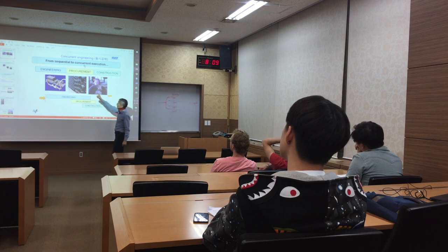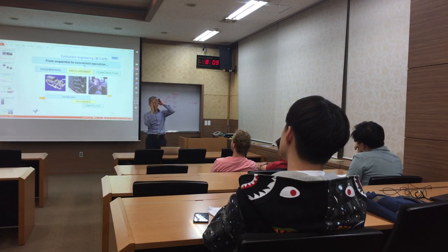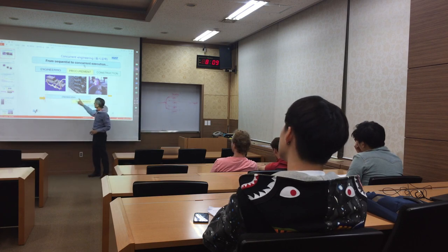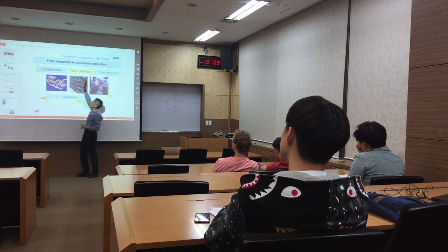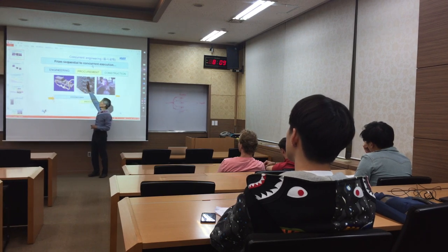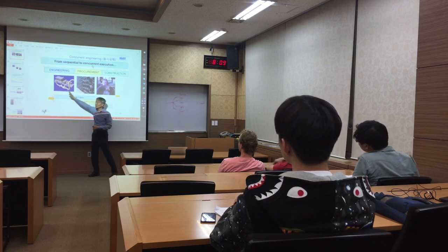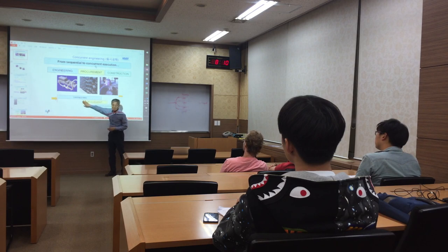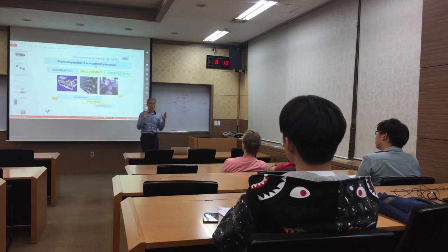So here, engineering department, structure department, construction department are separate divisions, like a specialist, separate CPU for computing. They want to make it work in parallel, but that is not possible in engineering. Somehow, they start their work before the end of the previous department. In old days, they did it in a sequential way: after finishing designing, they started procurement. But nowadays, they want to reduce time to market, so they start earlier than the finish of the previous work. That is the idea of concurrent engineering, to reduce time.